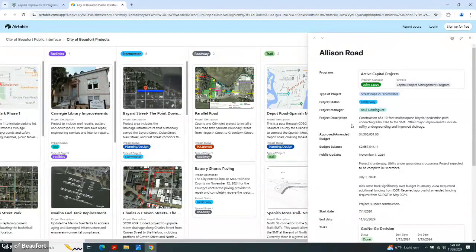We are 95% complete with the Allison Road project. We're down to final inspections. The sidewalks will be poured hopefully in a couple of weeks. Again, it's a utility issue with having the utilities come out and do their work with the electrical, taking the lines down off the existing poles and removing the posts, and then we'll be pouring the sidewalk. We should be wrapped up on time in December by the end date of that project. Were you on budget on that? Yes, sir. Thank you.